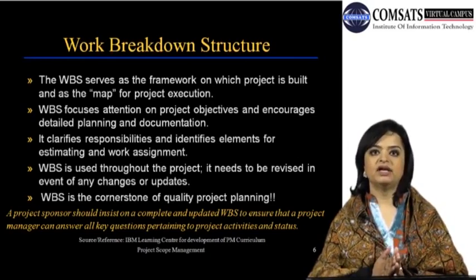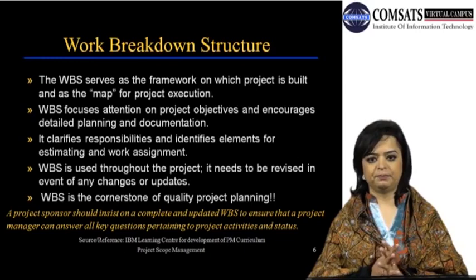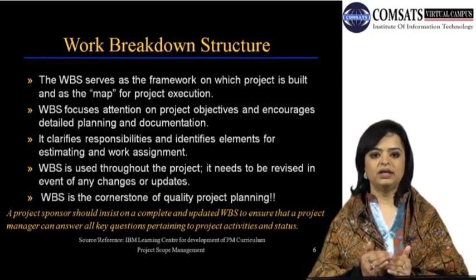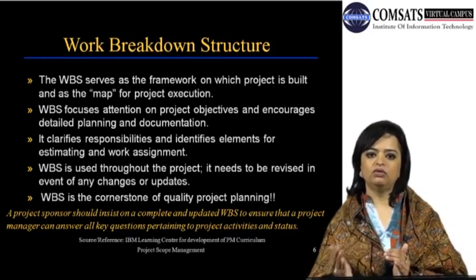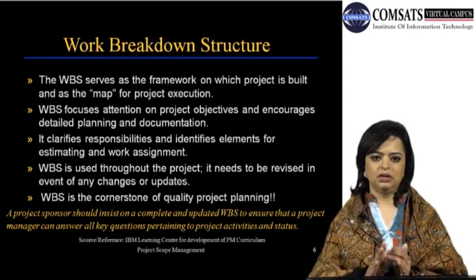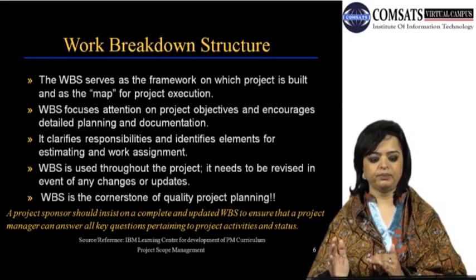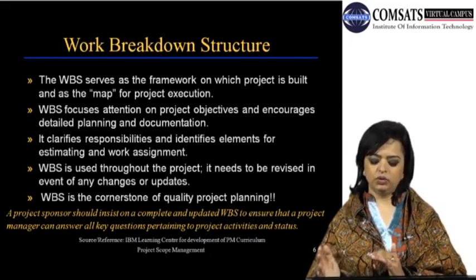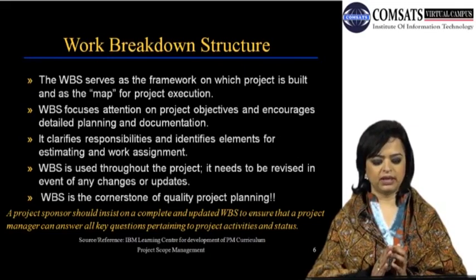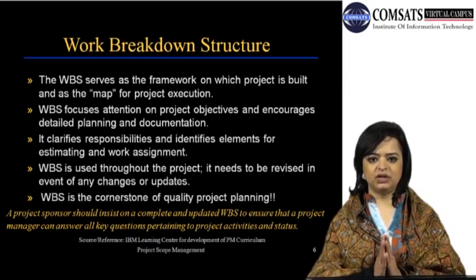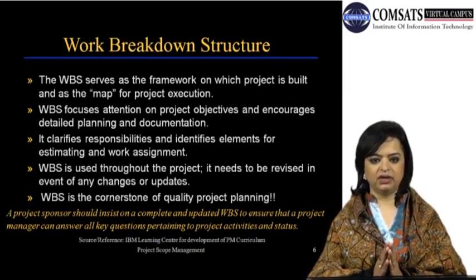WBS also clarifies responsibilities and identifies elements for estimating and work assignment. So if you keep drilling down, you will come down to a level of who will be doing what activity, and you're using this WBS for subsequent planning. So you're ultimately going to assign people to those sub-activities. You're going to start estimating the schedule based on what you have identified.